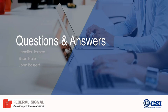So two questions. First is cost. How did operating costs compare from what you had before to going to Oracle Cloud? So we had a bogey. We were off of JDE support, but we also needed to buy upwards of $1 million of database on-prem licenses to scale the way that we needed because we had a lot of data. So if we wanted our next platform, whether it was staying with our same hosting provider or moving to any cloud, we needed to procure licenses, and we were able to do that in an OpEx fashion by moving to the Oracle Cloud.